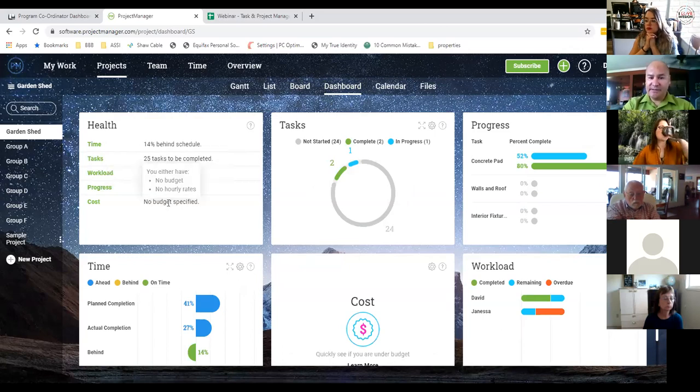I haven't put any budget in this yet, so I'm not going to go there. So on my task sheet, not started is 24, complete is 2, and progress is 1. Okay, progress. Now, this is where I would give the customer access to this sheet, right? So the customer can log in here and they can see, right, what's the health of my project? And this alone saves me hours in just reports, okay? So from here, if I was a customer, well, concrete, you said you'd be 80%, you're 52%. I'm not so worried, okay? I know you can recover.